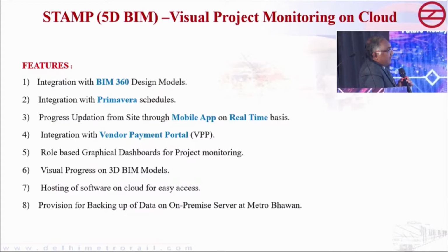Similarly, for future contracts like the track, he can see the stages: whether the contract is awarded, whether the design stage is completed, or whether procurement is being done. Vice versa, the system contractors can also see. They know the planned date of the access dates initially, but now what is the estimated access date, and whether we are arranging all our designs as well as procurement by that time. So that is important at the mid-level.